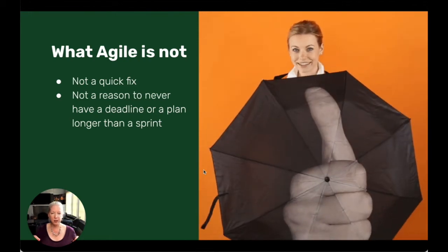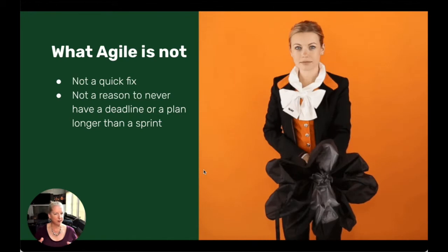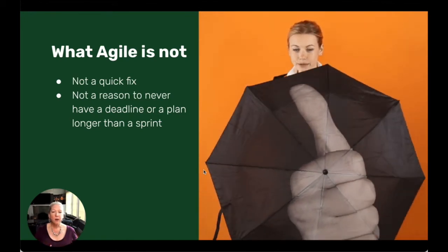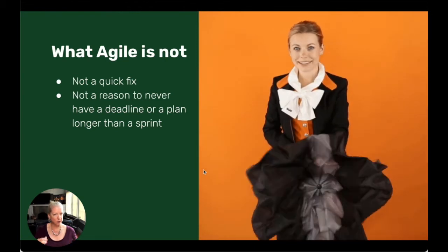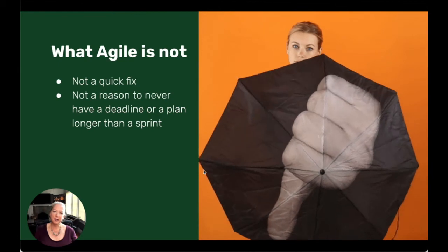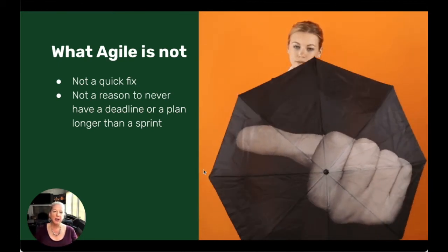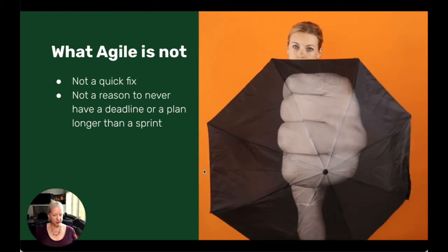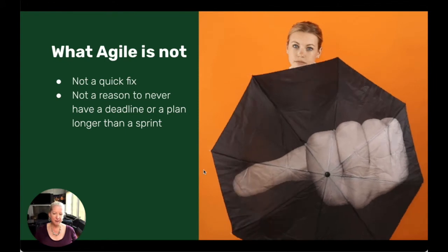And sprint, just as a reminder, is a time period that you're using to deliver software in. You can look at how much work your team usually gets done in a sprint, what's called the team's velocity. Then you can project out over several sprints how much work you can get done and say, hey, over 5 sprints, we think we'll get around about this work done. And so this is what our release plan is. So you can definitely plan out longer than a sprint using Agile methodologies.